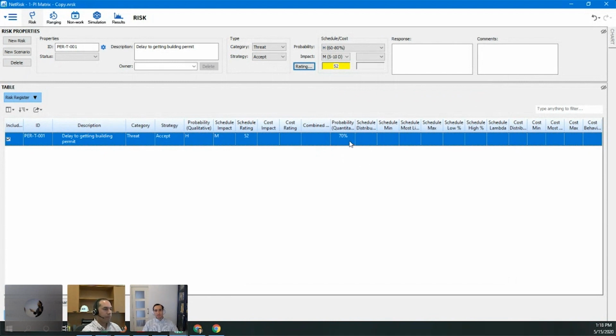I'd like to choose a schedule distribution type here. So we do have a mix of the qualitative columns that are sort of to the left, and then some of the quantitative ones to the right. So we can start by choosing, once we want to move into the quantitative analysis, what might be the distribution for this impact. So if we're talking about 8 to 12 days, how's that going to be distributed over the activity when we want to sample? And we'll go ahead and just enter these right in the report. It's a spreadsheet style interface, so it's going to be very familiar, very nice for those folks who like this type of input. And once again, just bear with me, there's a little bit of lag. This is not going to happen when you're using the tool live.